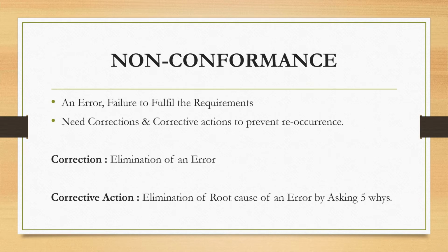Now we will know about non-conformance. It is an error or failure to fulfill the requirements. It needs corrections, corrective actions to prevent reoccurrence. What is correction? It is just elimination or rectification of an error. And corrective action is known as preventive action. It will eliminate the root cause of an error.